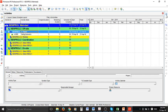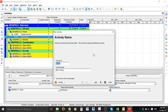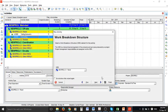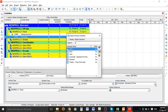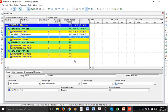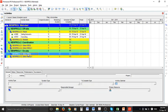I can add a new activity to the Panel and name it 'Concreting'. We click Next, the WBS level is okay, so let's click Finish. Again we can change the calendar to the appropriate one. We can do the same process for any of the WBS levels — for example, for On-Site I can add some activities as well.